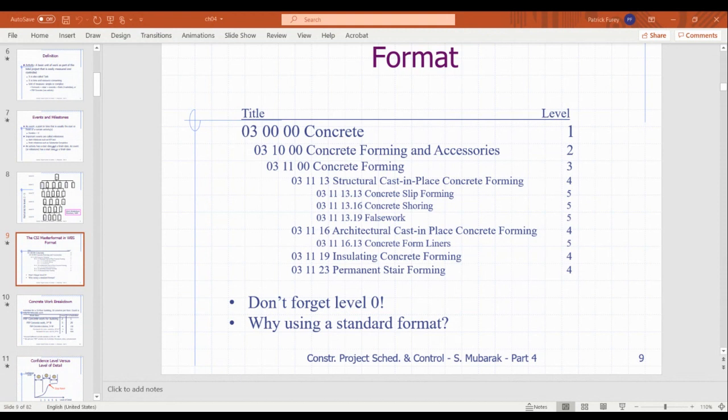There is a section on metals. No, darn it, I was wrong. It's metals. So if I wanted to look at that louver, sometimes you have to think, all right, what division is it? A louver usually is metal, but it's also a wall component and all kinds of stuff. It's related to the HVAC system, but from working on it previously, I know that usually Division 5 has the metals and the extrusions and all that stuff in it. So usually that's where I'll go look for the louver. The organization is done to help you standardize and easily use the information and work with it quickly, and there's a logical, constant standard you're usually working from.